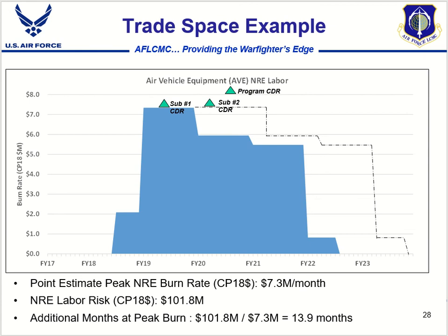burn rate. Given our risk assessment for this element, we can then assess whether or not this seems reasonable given the initial program schedule and the program's level of risk. You'll always want to consult with the program team and involve them in the development of these trade space scenarios, and then always get feedback from them once you've done the analysis to get their buy-in that it also makes sense.